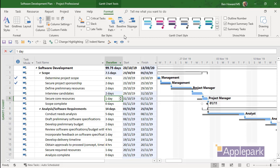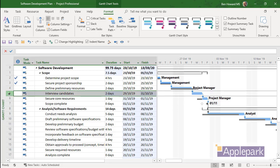So what I really want to do is modify these tasks onwards and take a new baseline for those tasks. You can see that this task, Interview Candidates, doesn't have a baseline because I've just created it. The other activities do have baselines. The baseline is there, but the tasks have moved on.